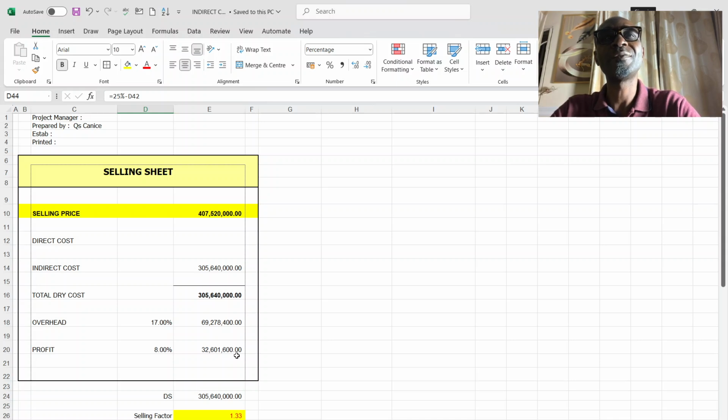But if you have the time, there is the need for you to price every aspect of it, because you know what they still do after getting that percentage? They check the inflationary rate between the time that project was done and now, and apply it on whatever percentage they have arrived at to get what it should be now.